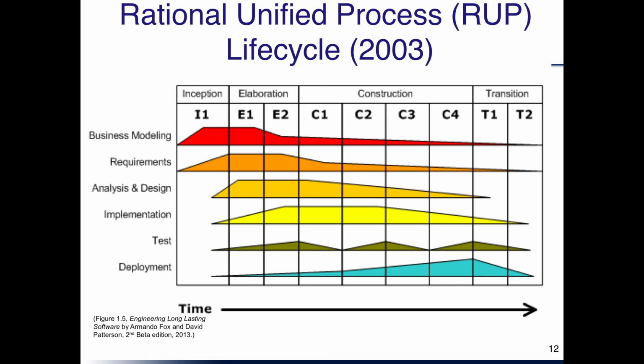Deployment is kind of the opposite profile. Deployment happens at the end, the very last of the construction iterations, and the beginning of the transition phase. Testing happens periodically with releases, and a lot more of the effort is in the implementation. So that your team has these skills, and you may need more of them, the different skills later.